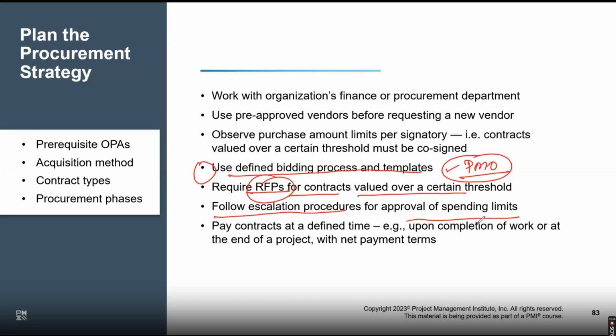And as and when a vendor's job is done satisfactorily, so this vendor was hired to do a job, there was an acceptance criteria. This guy did the job correctly. My quality team said, good job done. Verified deliverable. Customer did validate scope, where the customer said, okay, good job done. Now this job is done. Bottom line, I have to inform the procurement team that this guy's job is finished. The customer, internally and externally, has approved. Well, please go and make the payment as per the contract you have signed with this vendor.